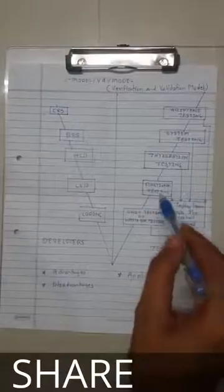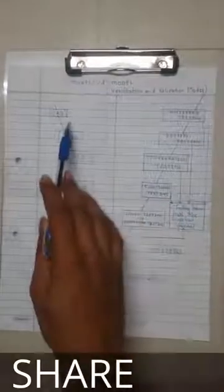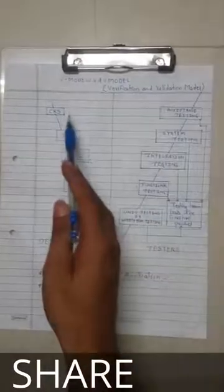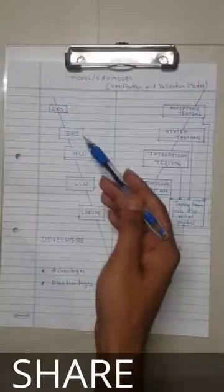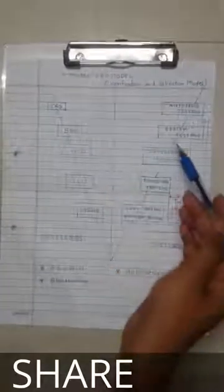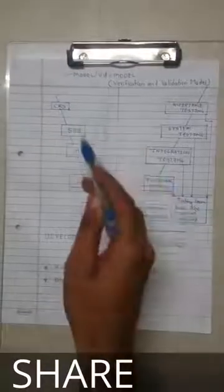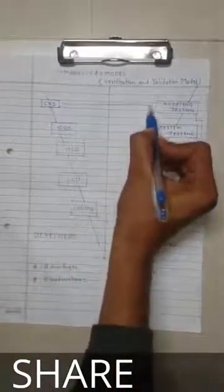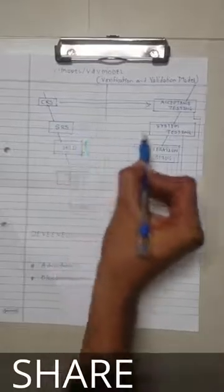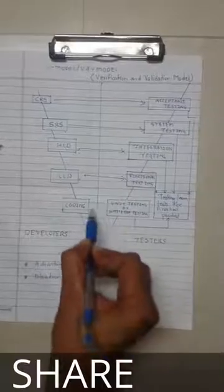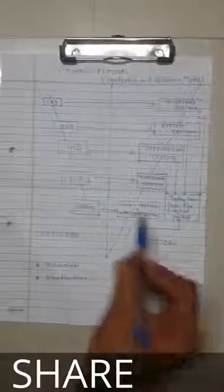To summarize the cycle: first CRS is created, then it is converted to SRS. The testing team reviews the CRS while the SRS is being developed. Developers then move to HLD, and the testing team tests the SRS. The sequence proceeds through acceptance testing, system testing, integration testing, functional testing at LLD, and coding.